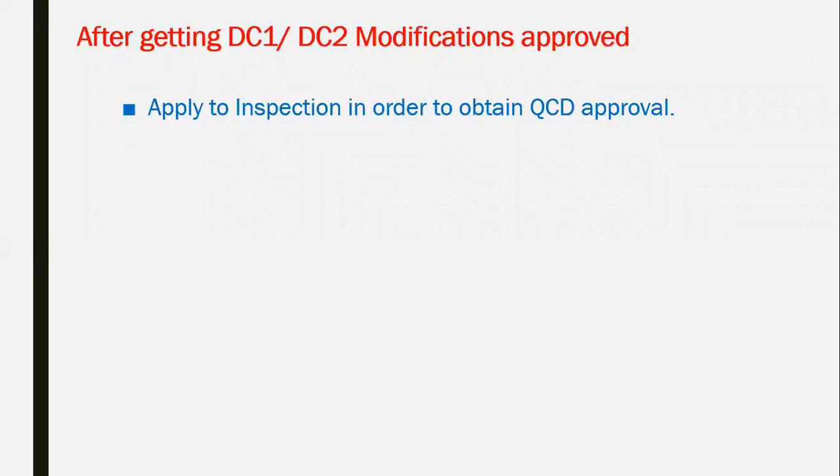In the same way as the application, you will have an open file for the application, so you can reply to the comments one by one and upload all the supporting documents, modifications, site photos, or drawings, depending on the comments themselves. Having submitted this to the civil defense, they will review the documents and come back either with additional comments or rejecting your response, asking for other modifications and supporting documents, or they will come for inspection or give you approval for the building.